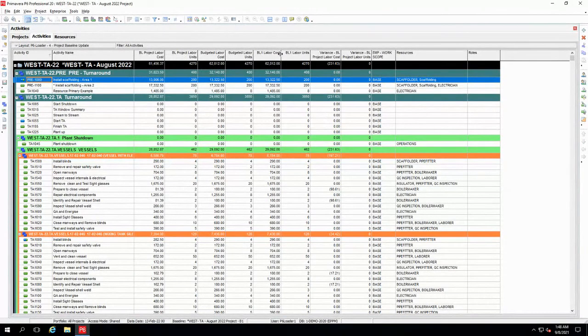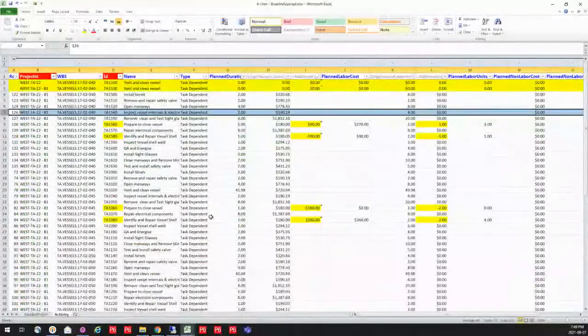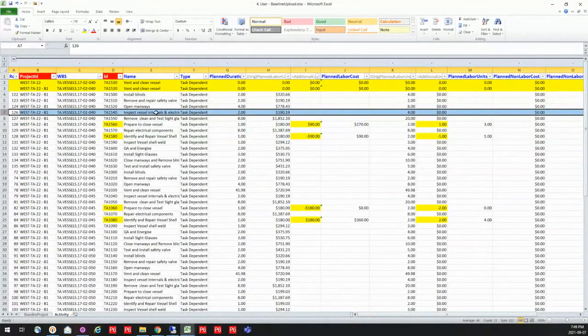I've got my actual project costs and all that in here. And then I have kind of a control. I have actually two baselines. So I'm going to change the main baseline and I'm going to keep my other baseline intact. So what I can do is I can go to my upload here and I would extract out my baseline information and then I could edit it.